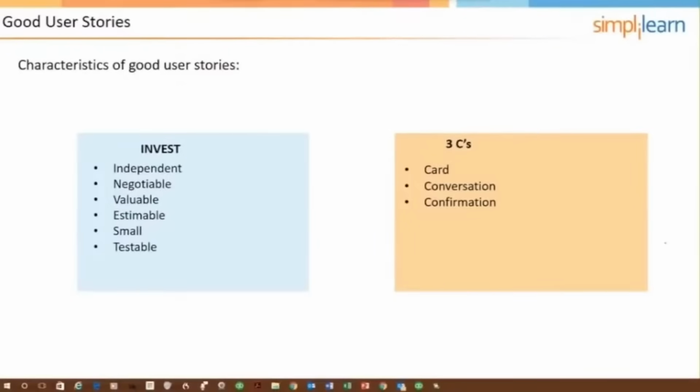Each user story essentially has to have acceptance tests in it itself. So card 4 by 6, conversation, that's the starting point. That's where the team and the product owner discuss, and then eventually there will be acceptance tests included on the user story card in order to be used during the sprint review to assure that it's acceptable, that there's confirmation. Okay, so let's add that to the memorization list.